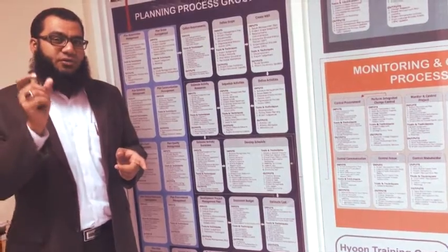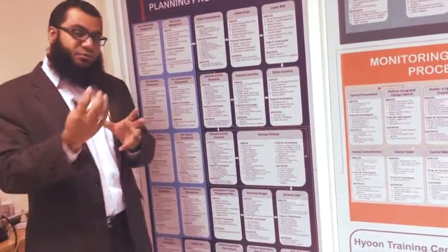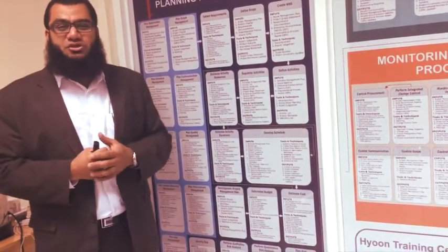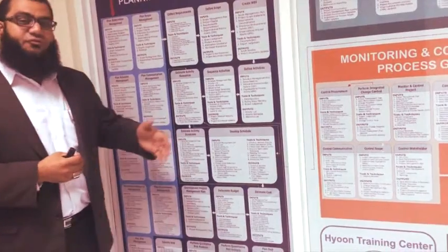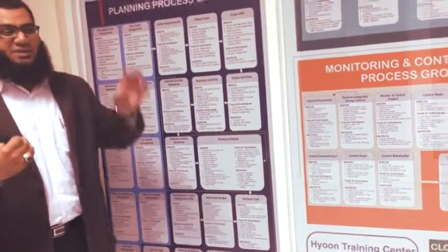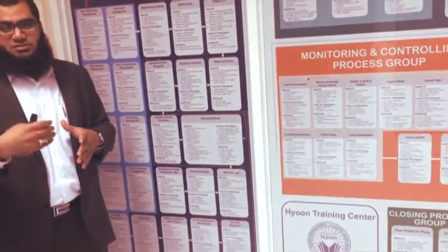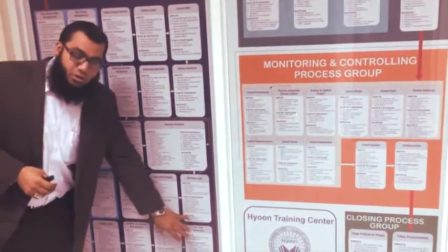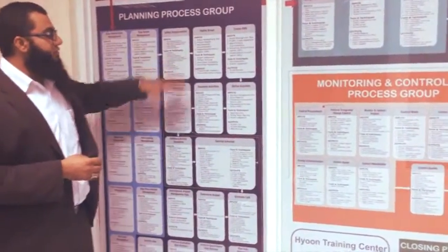You're talking about the amount of money for each risk, which one is costing you 1 million or 5 million or more. Then you pick the higher risks and go with risk response. You plan the risks, you come up with a response, and this is what you will be doing all over your project. This is part of your plan.